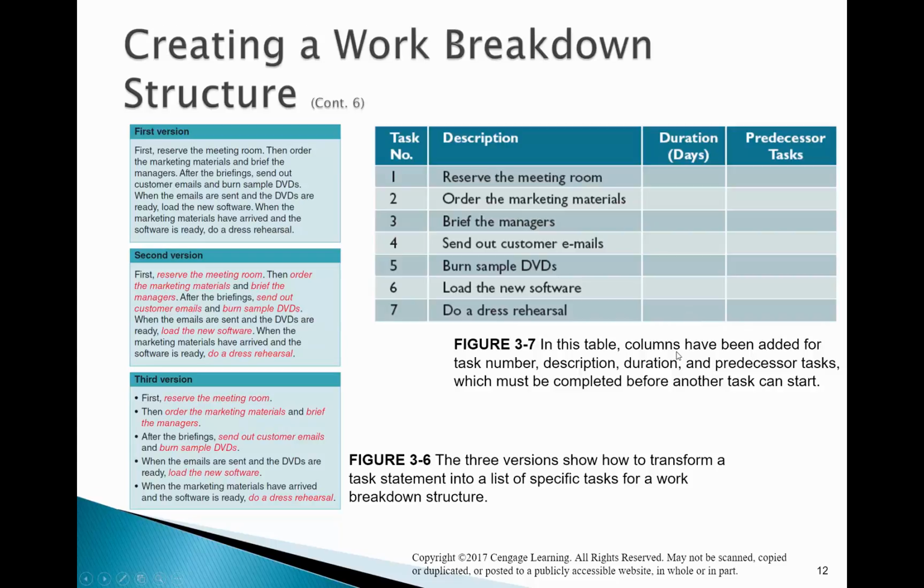For instance, if I was doing a military mission and I was inserting soldiers into a combat zone, then I would look and see what time does the Air Force want the troops to be inserted, because they're going to blanket the area. They're going to bomb the area and blanket the area and preserve it and everything. So if they're going to do it at 10:30 in the morning, then I'll bring the troops in at 10:35. Everything is settled down. But you reverse plan that. So my time on target would be 10:35.